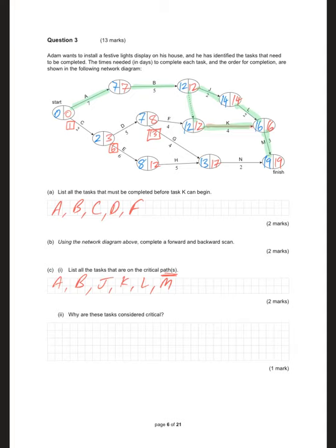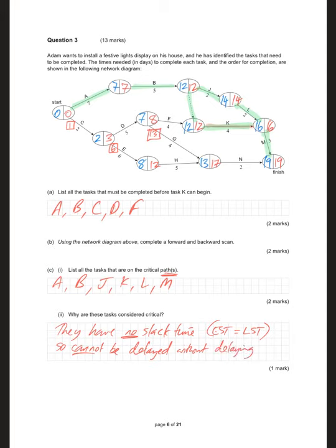Why are these tasks considered critical? They have no slack time. EST is equal to LST. So they cannot be delayed without delaying the overall project.